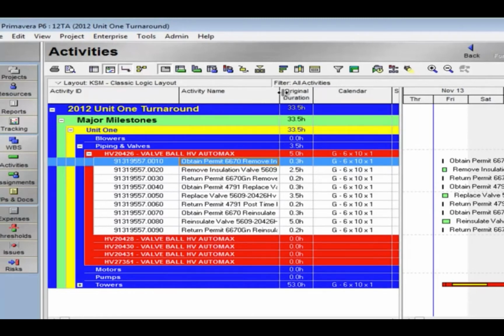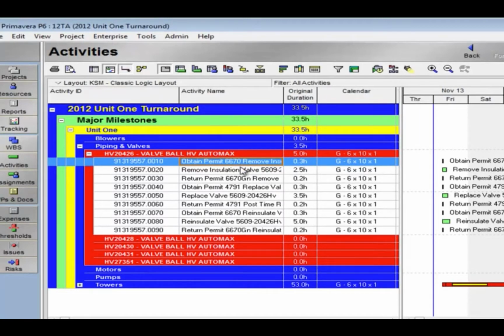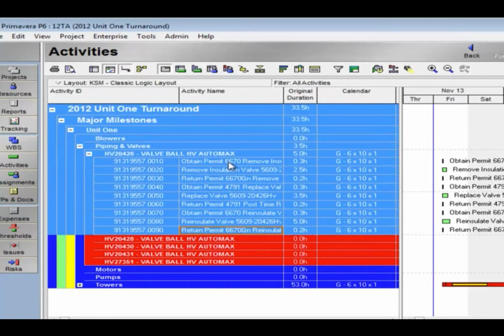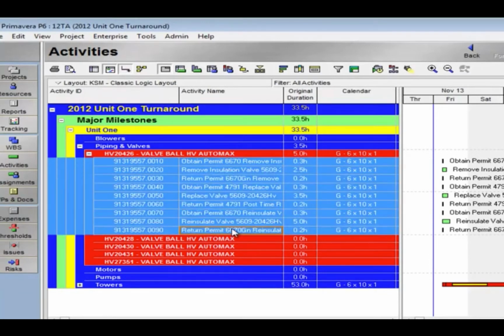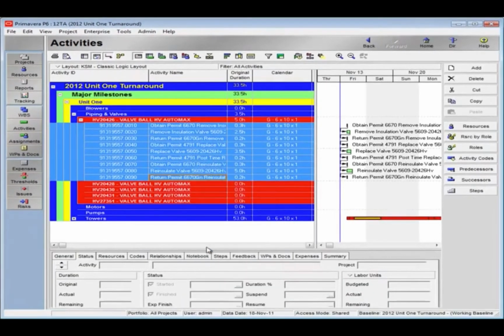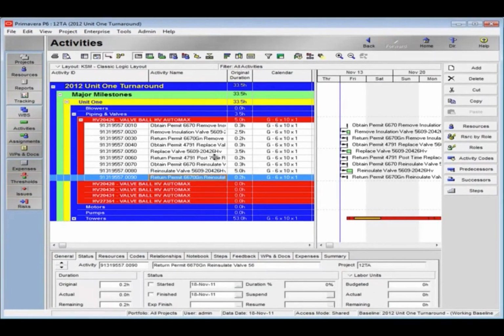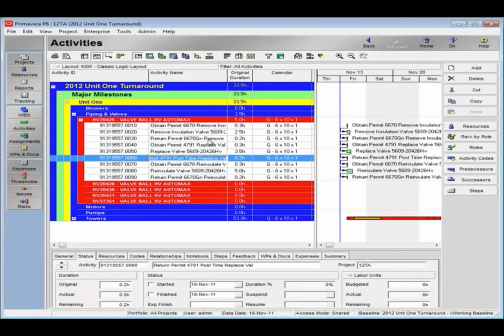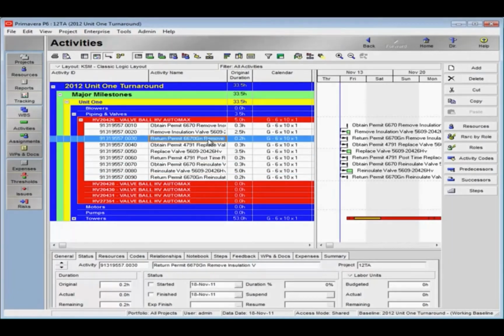Or the WBS code. So, like I said, some people don't. They just put all the data at the top and they grab that data and they move it down into it. But I like to take the time in Excel to clean this up. Now we can come in here, highlight the activities, and if you want to link those together, you can actually link those activities together. So we got the data structured, built, and actually moved into Primavera via the SDKs.